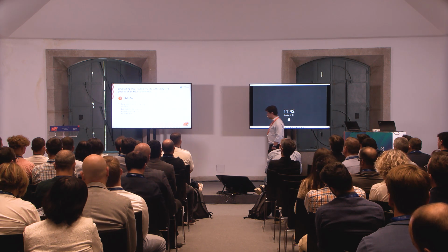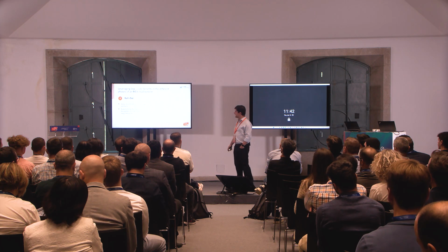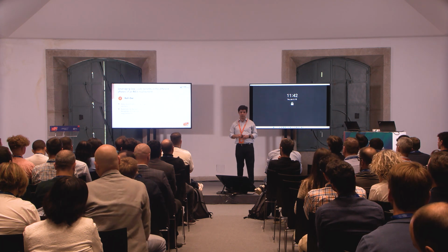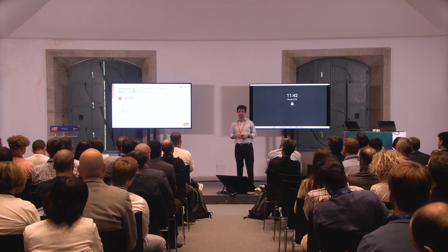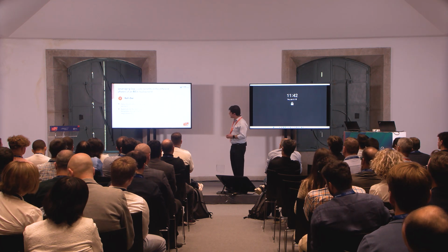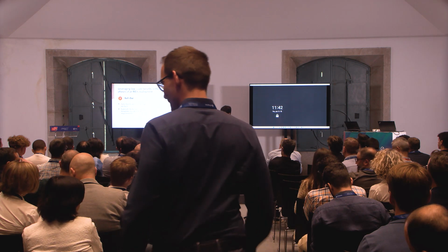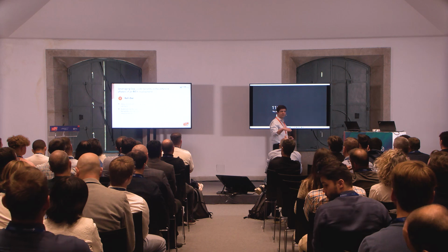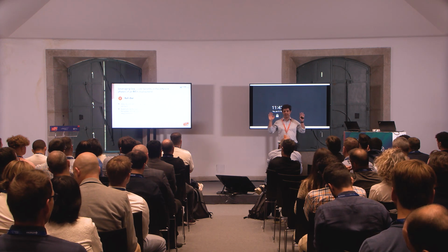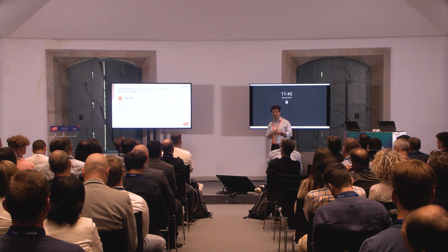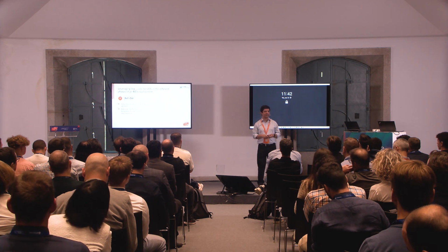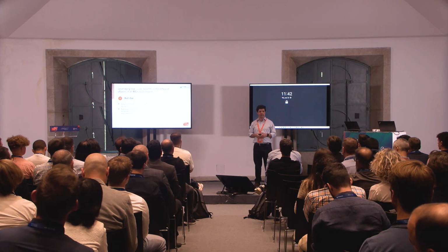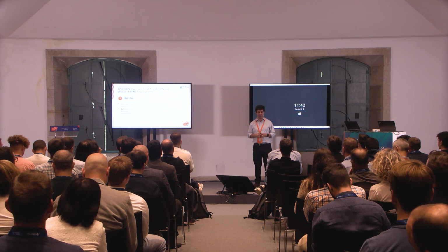Now we go to the rollout stage. And here we need to understand that if you have a multi-site plant, you probably are going to have a template that you want to share across the different sites. And these templates, this looks very nice on paper, but then you do your first site, and then you go to your second site, and they will say, no, that doesn't apply to me. I work differently, right? And then you have a challenge, because you have a baseline, a template that you want to apply to all sites, and you have your site saying, no, I'm different. No, I don't care.